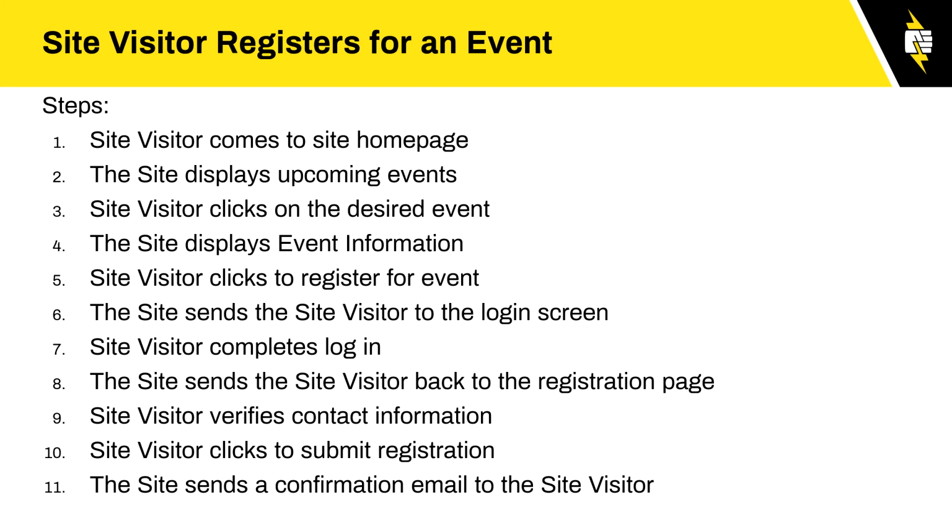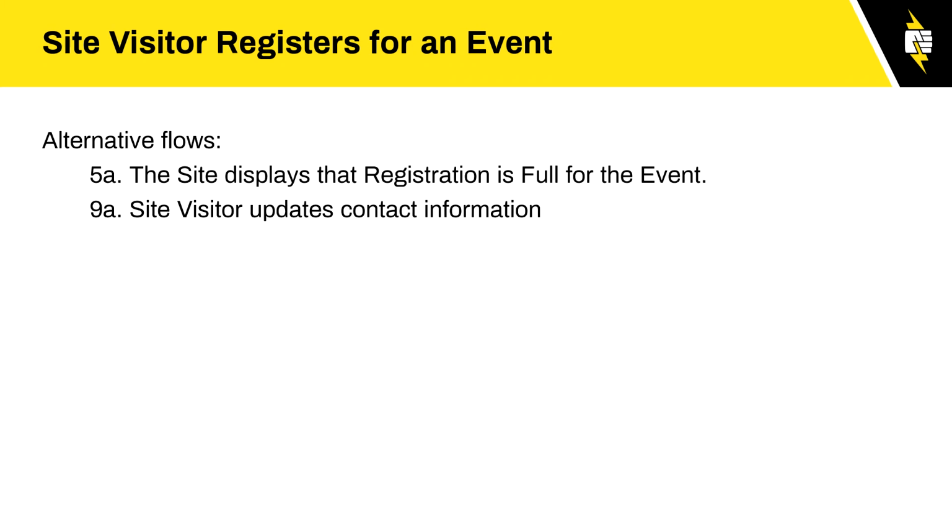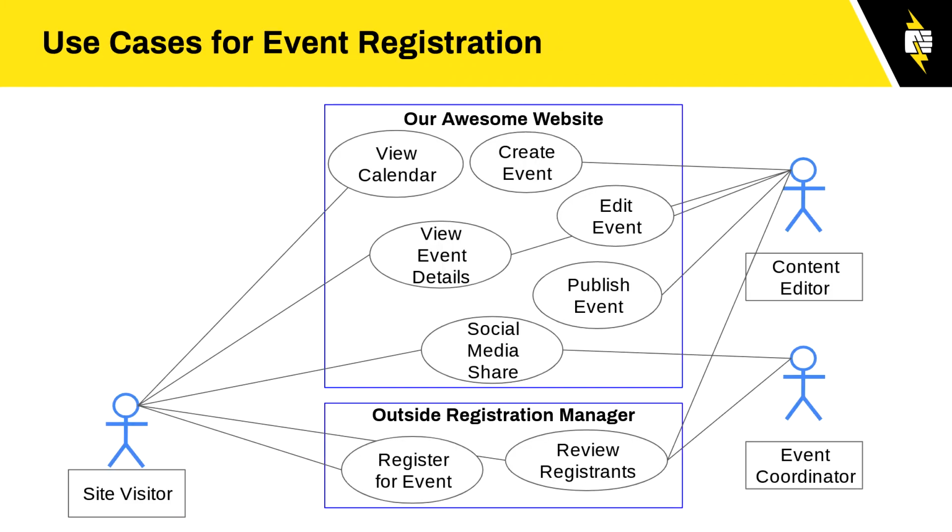And one of the things you can do is split the personas up around your team and have them all come up with a workflow that they're envisioning based on that persona and see how they differ and what functions are happening and things like that. And a lot of that then turns into these alternative workflows. I think to some extent the way I've seen it happen for us is start off with a persona, but then it turns to an archetype because you're focused on what are they doing on the site. Yeah, I guess in that sense, exactly.